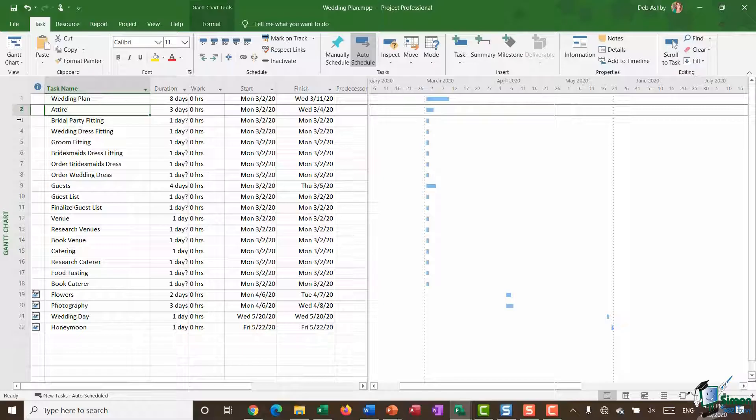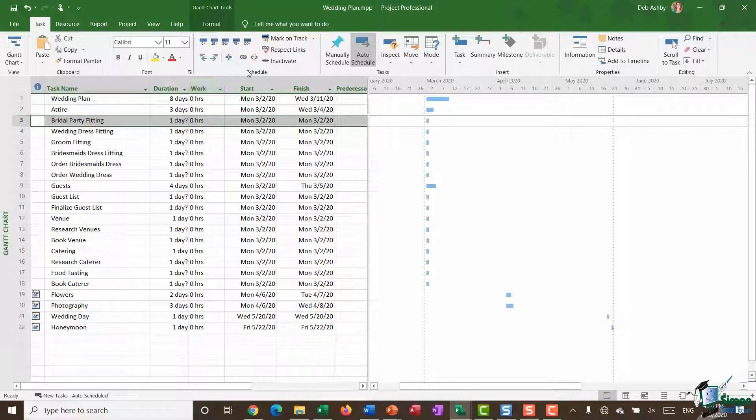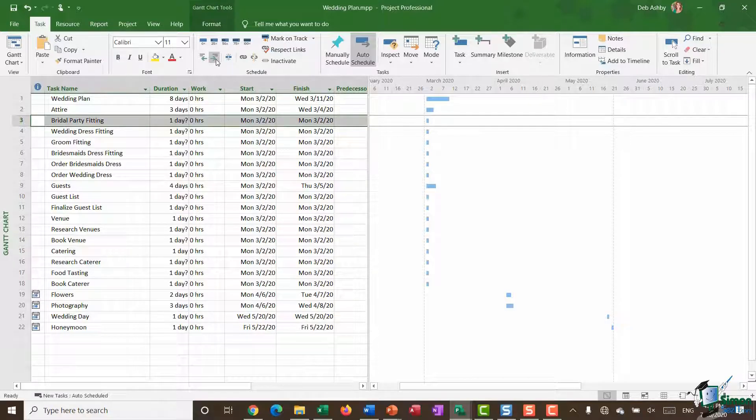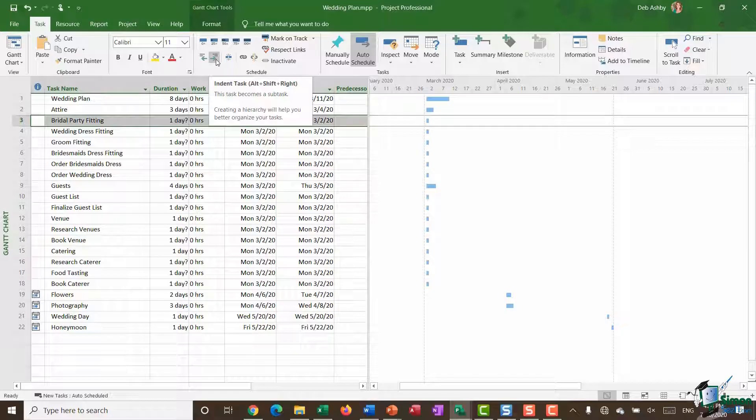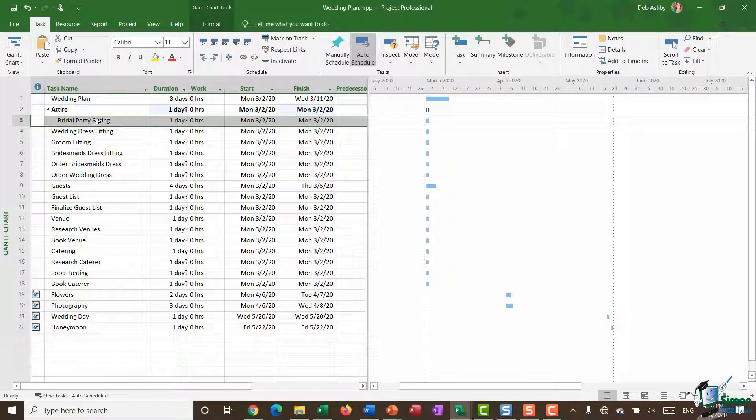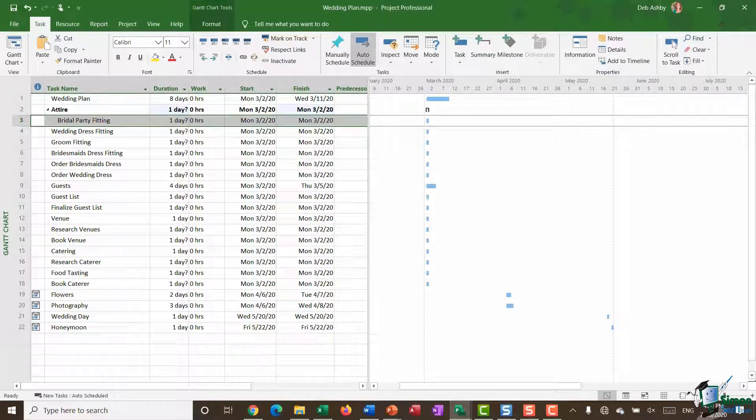So the first task here, bridal party fitting, I'm going to highlight that. Then on the task ribbon in the schedule group you can see we have an outdent task button and an indent task button. So I'm going to say indent. You can see that it's indented that task so I now know that it's a subtask and it's made attire a summary task. That's now showing in bold.